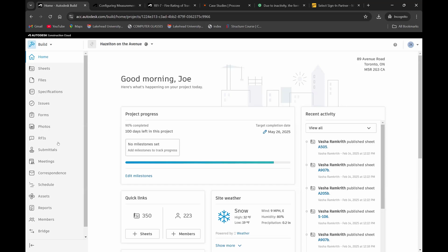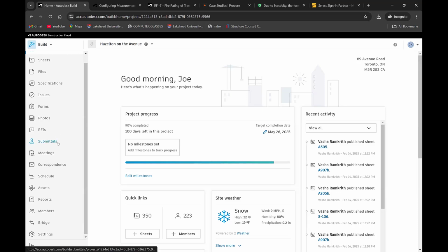They make a team. The construction management team will be a project manager, project coordinator, and project administrator on one side, doing the budgets, scheduling, and all the internal documentation. On the other side, we have the general site superintendent, site superintendent, and the assistant site super. They will be on site working on the execution side. So the whole team collaboratively uses this Autodesk Build software.